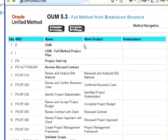The MOSCOW is the details. M, what is absolutely essential for the next iteration. S, what is planned to be ready for the next iteration, but we have a strategy to operate some time. C, what is left out of scope. And W, what is left out of scope for now and probably for the next few increments also. So again, it's a phase that you do it. You could do it in Excel.